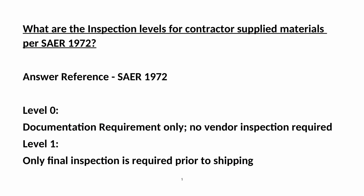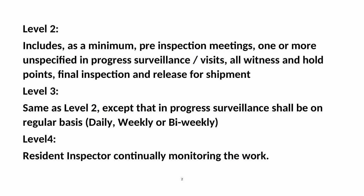Level 2 includes, as a minimum: pre-inspection meetings, one or more unspecified in-progress surveillance visits, all witness and hold points, and final inspection and release for shipment.